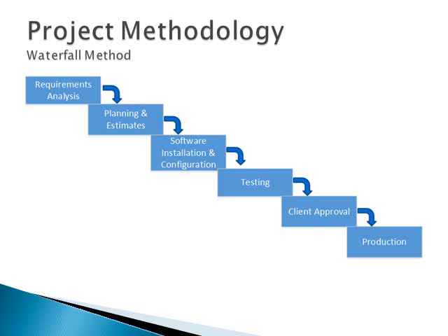Because the requirements were well understood, a systematic sequential approach was used for this project. For that reason, I chose the waterfall method. The requirements analysis and the planning and estimates phases were completed in semester 1. At the end of semester 1, client approval permitted work to begin on the next phases, including software installation and configuration and testing.